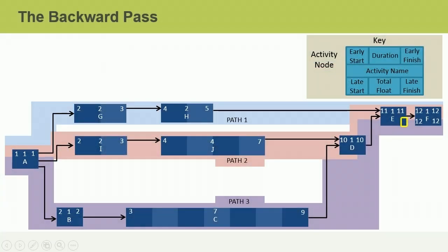When we develop our schedule, we use a schedule network diagram. Then, in order to figure out how long our project will take, we conduct a forward pass to determine the early start and early finish dates for all of the activities in our schedule. Most schedules have activities with flexible start and finish dates. In order to determine which activities have flexibility, we will conduct a backward pass. In our example, the durations are expressed in months, and our project will complete at the end of December.